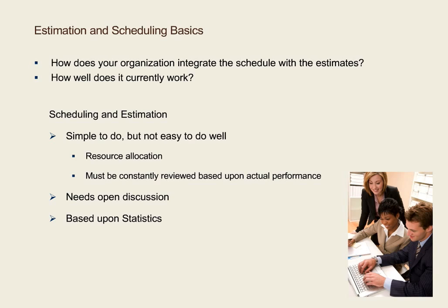It is critical that the project team remember that the schedule is really to allocate resources. We tend to focus upon dates when really the dates are an outcome of allocating the right resources to the work at the right time. Scheduling must be an ongoing activity throughout the project. The schedule should be revised based upon people's actual performance.